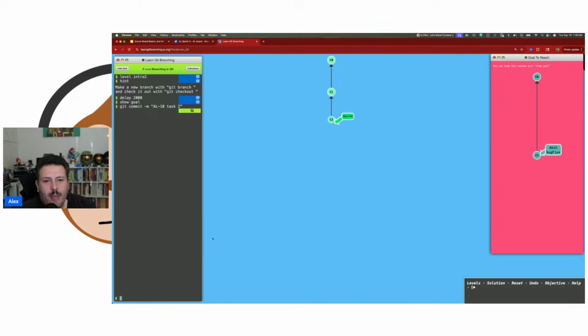They're going to hit Git commit, and this will create the snapshot, right? It'll create, okay, I saved something. And folks, this is very, very important. Again, if you're multitasking, you're going to want to pay attention. Your developers have to put the key in every commit message. If they don't, Jira won't know about it.